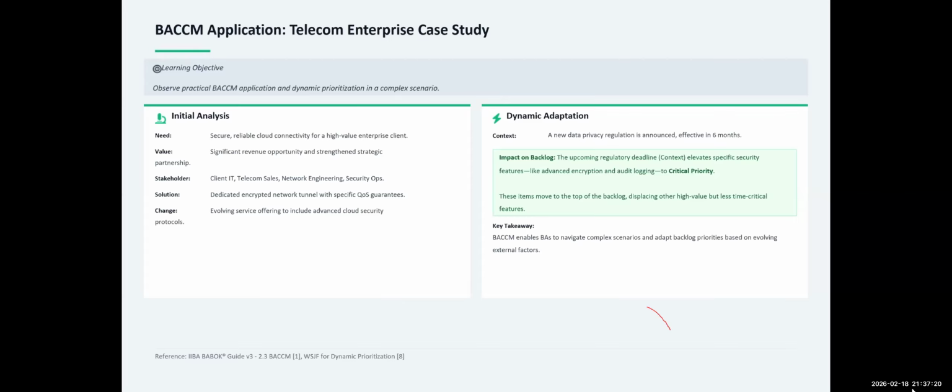So if you want to ensure that you complete a sprint, because in Agile, Agile is about 2 to 3 weeks, right? And you want to finish something, and Agile says whatever you have to do, 2 or 3 weeks, you should be able to deliver it. So if it's not small, if you can't deliver in 2 weeks, then it's not ready. You need to break it down, right? So that's basically what definition of ready means, to say what are the checklists, what are the questions that need to be answered concerning an item.